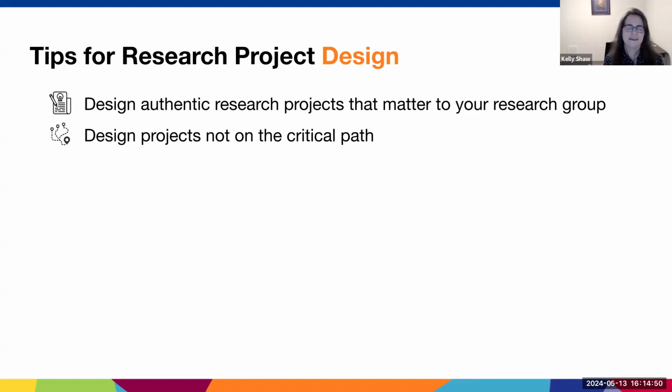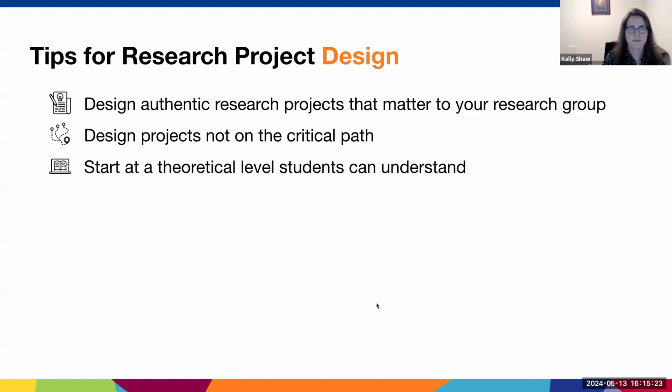And I say this because if you think about any time you were new to learning something, you made lots of mistakes. I know I do all the time. And you also were slow, right? So if there is an early deadline or a deadline that needs to be met for your research group, having a new student try and work on that specific deadline might be really hard and stressful for the student and for you. So we highly recommend designing projects that are not on the critical path, particularly for the first research experience students have. You want to make sure you start at a theoretical level students can understand. Otherwise, they have to do a lot of learning before they can actually be productive, and that doesn't lead to the best research experiences or the most productive ones.